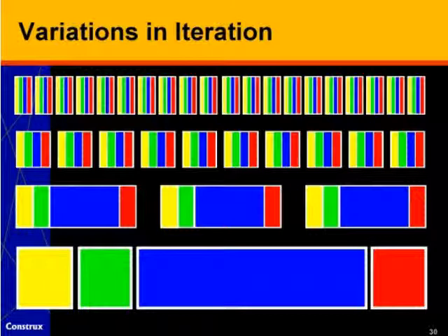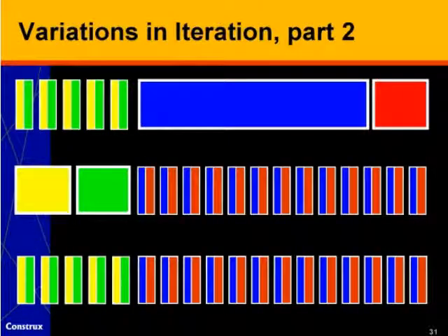And what this suggests is that the main difference between the waterfall model and Scrum and extreme programming, from a life cycle point of view, really is 1 iteration versus many iterations. I also want to point out that we can have other kinds of breakdowns of the activities in the life cycle models too. There's nothing that says we have to iterate everything or iterate nothing. We could have iterations of requirements and design, multiple iterations up front, and then do 1 development cycle and 1 test cycle. I'm not recommending that, but that would be possible.